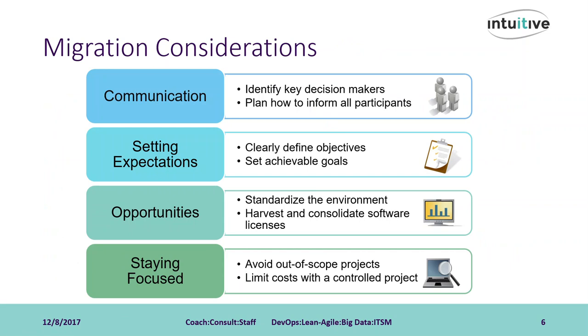All right, so along those same lines of project management, we want to ensure the project planning is thorough. Using these four pillars as guidelines for the migration project will help with the planning phase. First is communication. Build a project communication plan and stick to it. This should include weekly project status calls and bi-weekly project reviews with your project sponsor. Keeping the team and stakeholders informed of progress, status, and any changes to timelines, etc., is critical.